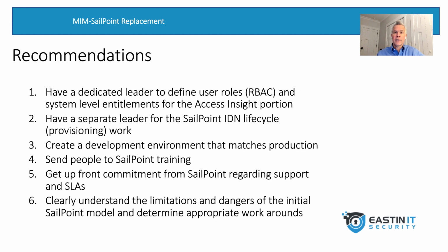All right, so let's get down to brass tacks and talk about recommendations here. These are some key things that I would really strongly urge you to think about. Number one, when setting up your project, especially if you're deploying the role-based module, you're going to want to have a strong leader to handle and lead the RBAC side of your project. It shouldn't be an afterthought, but a dedicated pillar inside of your IdentityNow project, where that leader, program manager, PM, or whatnot is driving data analysis and making sure that you're working with the business to rationalize, say in the instance of nurses, what AD groups should everyone be in? Do they really need all this access?